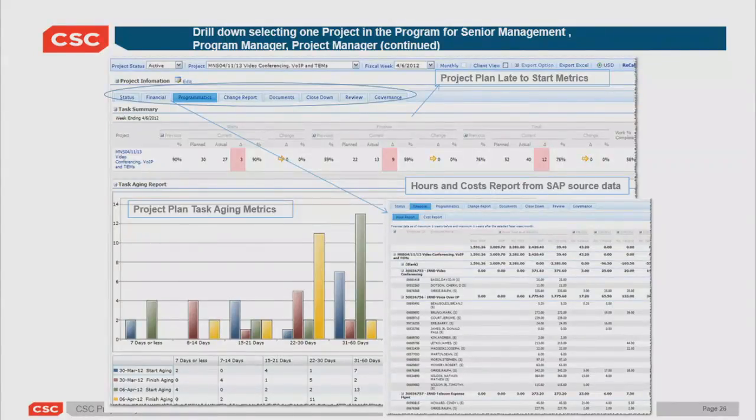And so this helps me capture if folks are having issues with charging, they're charging the wrong numbers, or they thought they were charging a number, and this gives us the visibility to keep that straight along the way, as opposed to trying to reconcile it at the end of the month or the quarter or whatever it might be. And so really a big impact on the financials, and when I do the live session, we'll go into some of that.